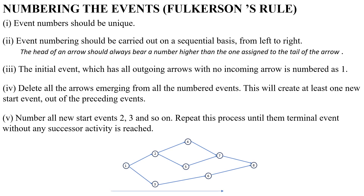Rule number 5 is, number all new start events 2, 3, and so on. Then repeat this process until the terminal event without any successor activity is reached.